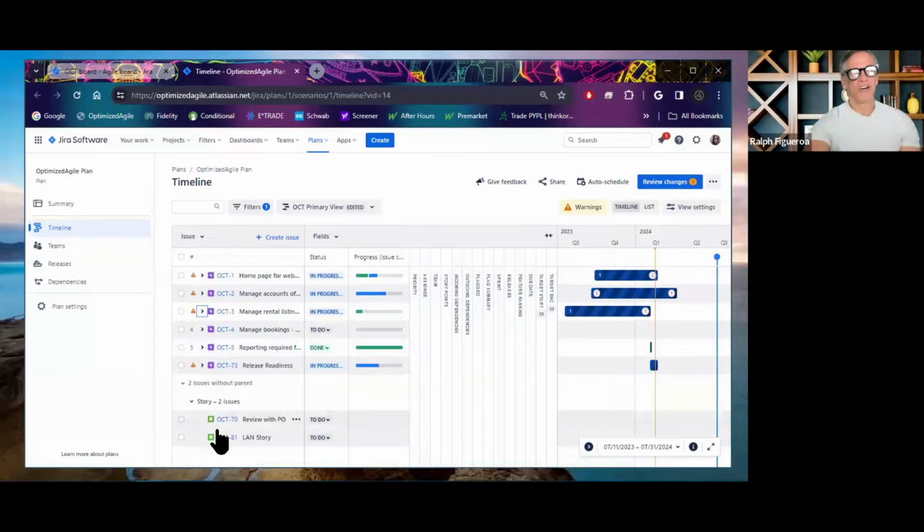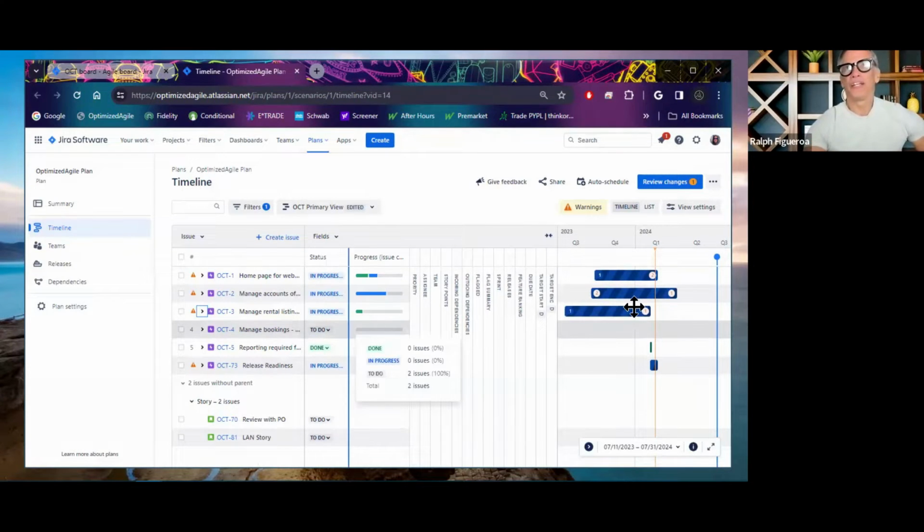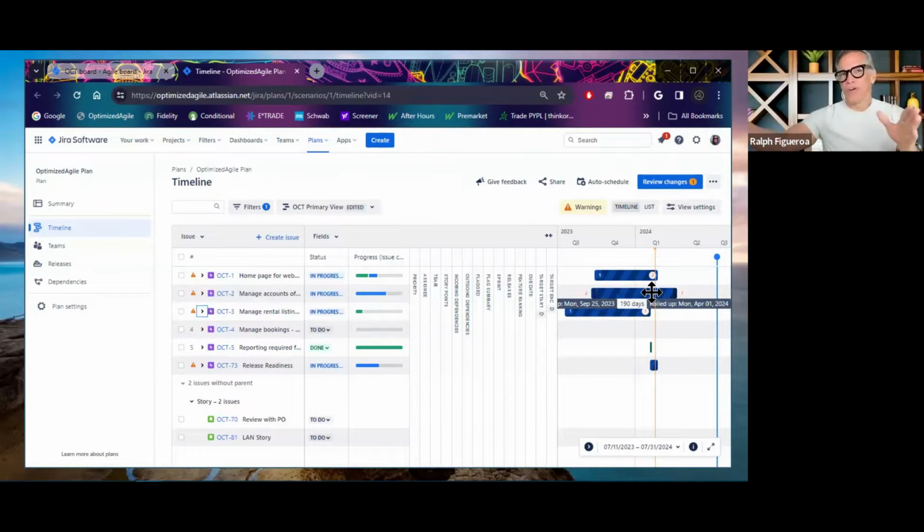So you can declutter a lot of the stories that are orphans, and therefore all your work really maps to this work belongs to this feature. Therefore, when you're looking at the Gantt chart view and the timeline view at the feature level, you can see the traction of progress of that feature as the yellow line gets closer to the blue line. Yellow line meaning it's today, and it moves automatically forward.